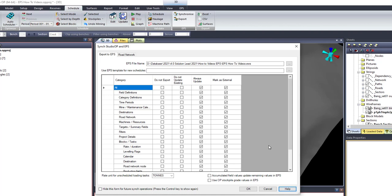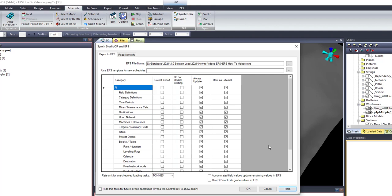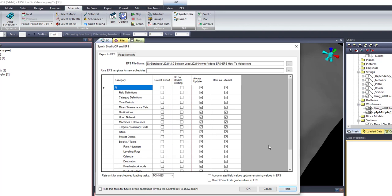The category grid allows users fine control over how data is pushed to EPS. The Do Not Export option means that the data from this category is not sent to EPS. The Do Not Update option means that the data from this category will not update existing records in EPS. The Always Update option means that the corresponding data in EPS will always be overwritten by Studio OP data.